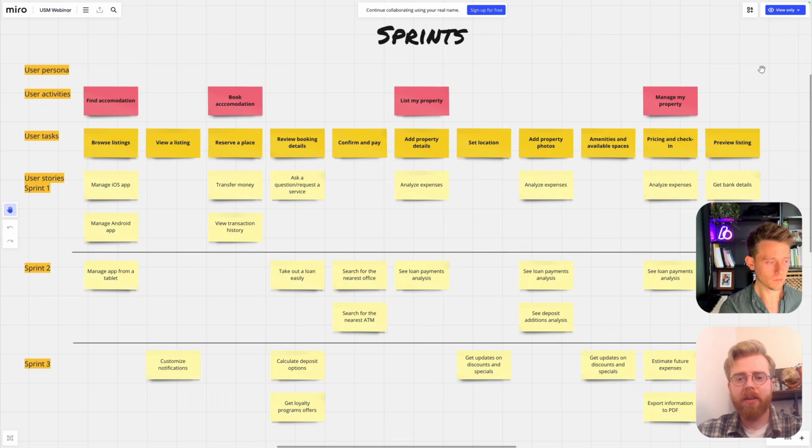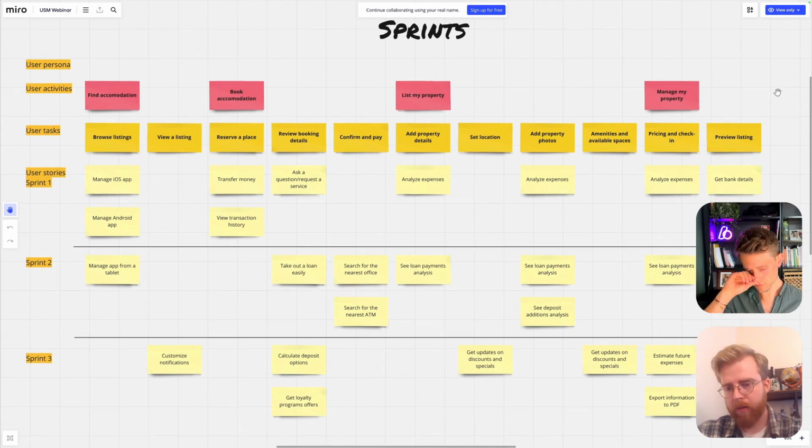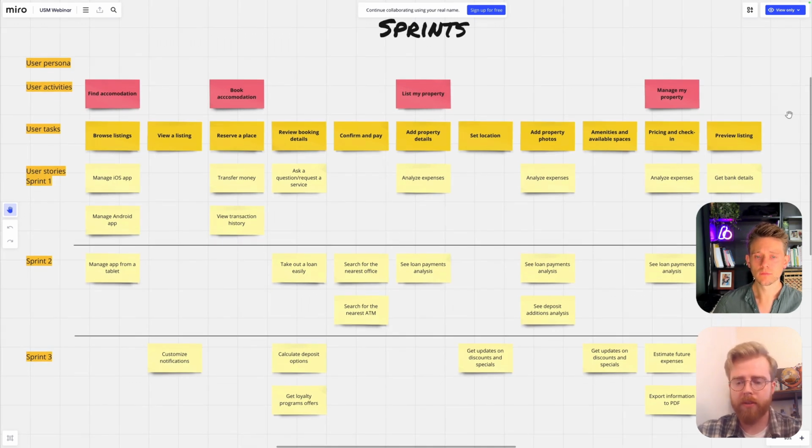So sprints, and it's using releases or slices in the story map as sprints. And I'll start by saying that story mapping should be agnostic of any kind of framework like Scrum, and it needs to be treated as such as well. I see this a lot, and I can have some sympathy with why teams default to this. But the problem is, at the end of each sprint, you've not necessarily delivered any actual value to the customer or the experience, and even less likely the business.